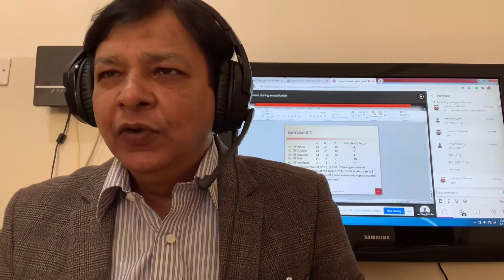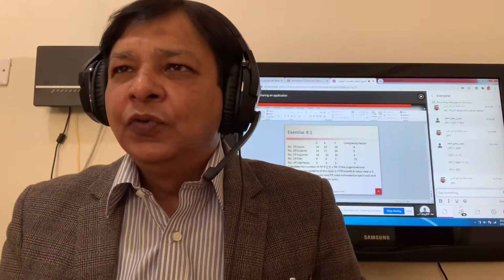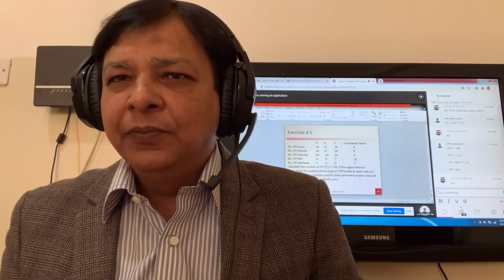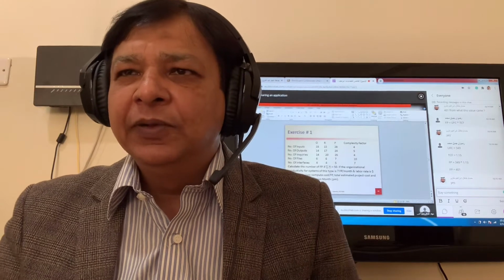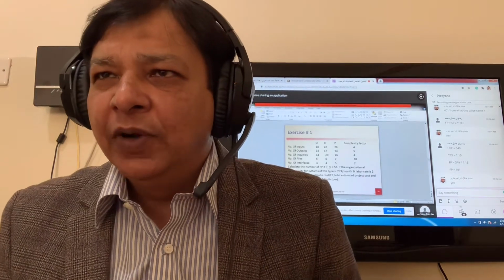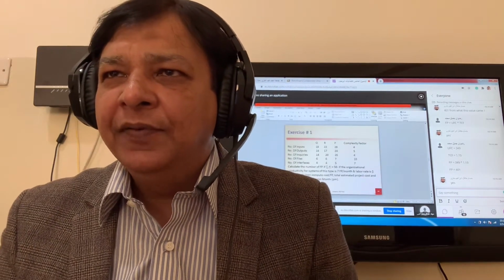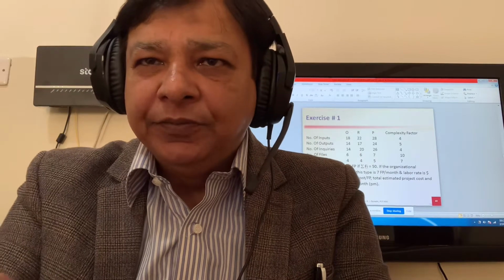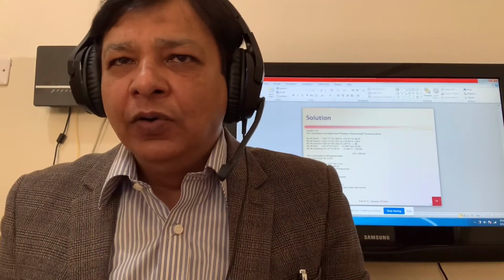Now we know the function point of the current project, so the cost is 401 multiplied by 571. That is $228,971. We can calculate effort as well in function points. We know the project cost and the labor rate, so project cost divided by labor rate is the effort.